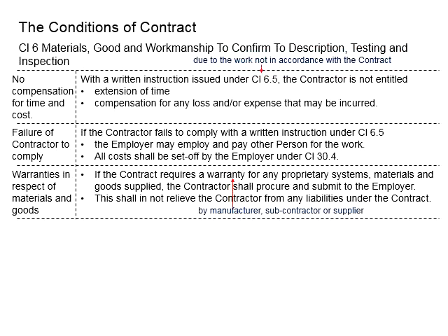They shall keep a record for the architect in the case that the contractor would like to challenge the architect when not granting the extension of time or not providing compensations for the loss and expenses related to the relevant work.